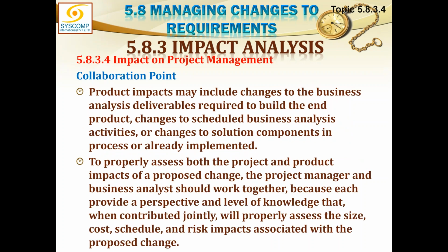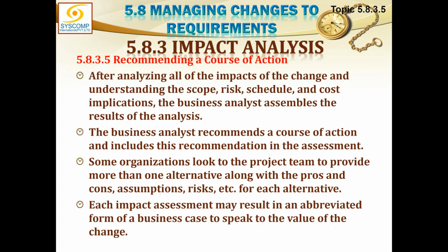Product impacts may include changes to the business analysis deliverables required to build the end product, changes to scheduled business analysis activities, or changes to solution components in process or already implemented. To properly assess both project and product impacts of a proposed change, the project manager and business analyst should work together, because each provides a perspective and level of knowledge that, when contributed jointly, will properly assess the size, cost, schedule, and risk impacts associated with the proposed change.